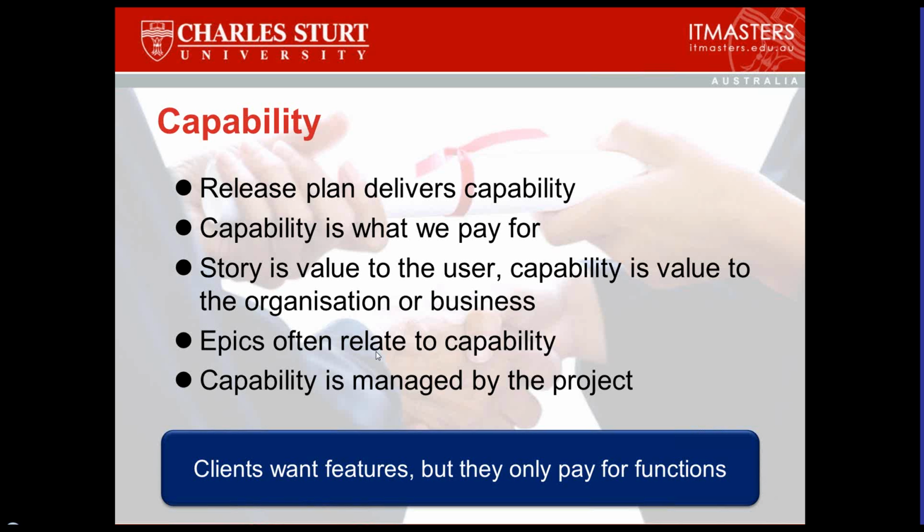The project manager is less likely the person involved at the iteration planning level. They are involved at the wave planning level that says, all right, well, at the end of this wave, we need to have these capabilities working so that I can invoice the client. Is that good? Good? Right, okay, carry on.